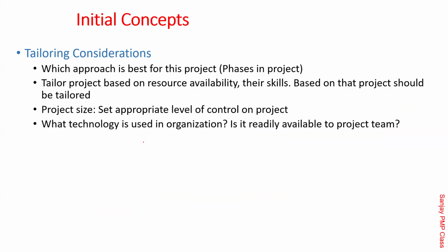Tailoring you can read yourself later, not much, but basically they are saying don't try to do schedule management, one shop for all. What I mean is basically they are trying to say don't make the scheduling the same way for all projects. The scheduling for a project which is going to run for 8 days using a tool like MS Project would be foolish. It will not make sense.